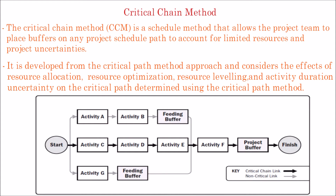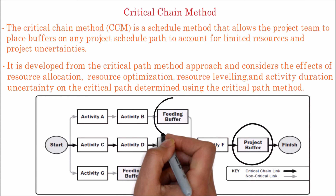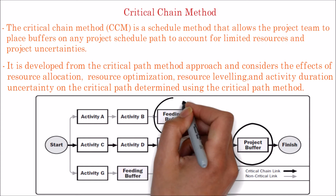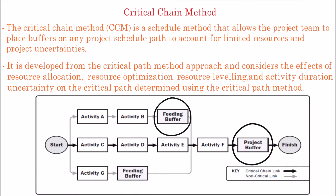The critical chain method adds duration buffers that are non-work schedule activities to manage uncertainty. One buffer placed at the end of the critical chain, as shown in the figure, is known as the project buffer and protects the target finish date from slippage along the critical chain.